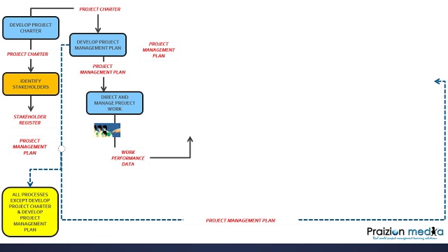As we're carrying out the plan, one of our resources just fell off. Bob on the conveyor belt is not coming in tomorrow. So what? Well, it's a raw observation. It's our work performance data. Bob's not going to be available. But wait, what's that going to do to our project? WPD is not enough. WPD needs to be analyzed. You see, so your train of thought needs to take every single one of these outputs and begin to think, what's the implication in other parts of the project? All right, you get the picture.